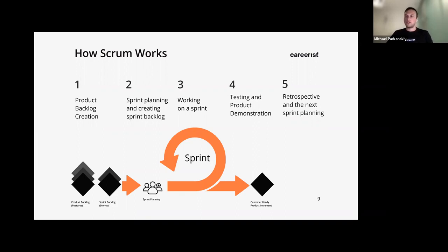Sometimes there's a drawback in Agile. The drawback in Agile is that sometimes you are working on and you're building and you're testing some feature that the customer at the end might not want, or they might change it completely. And you did all this work and it was like, oh, they don't actually want it this way, or they don't want this feature anymore to be released. Because you're always moving so quick and you're always making updates and you're building things so quickly.